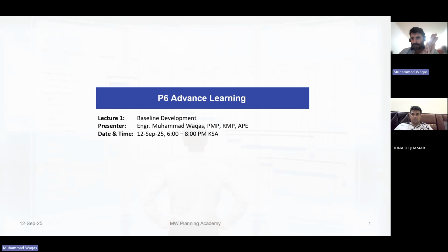The other narrative is very simple, which is related to the program itself, or the P6 itself, and it will be a high level summary, then manpower, then progress S curve, then main KPIs, major assumptions or issues. So it will be a 20, 30, 35 page document on PowerPoint, which will be with us from the scratch of the project, and it will remain till the expiry of the baseline. When I say expiry of the baseline, maybe you got the extension of time, and you are going to submit a revised baseline.